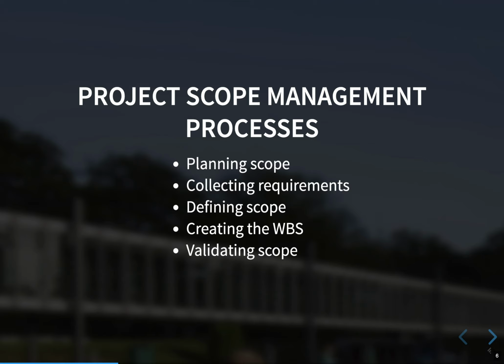It is about formalizing acceptance of all the project deliverables. And the last point is controlling scope. So control all the changes to the project scope which can occur during the life of the project. If something changes regarding the scope, if it is increased, new requirements pop up, or some issues occur which have an influence on the scope, you need to control and manage that.